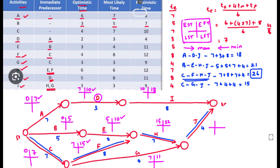For activity H there are two predecessors — EFT of E is 10 and EFT of F is 15. Going forward we take the maximum, so EST of H = 15 and EFT = 15 + 7 = 22. For J, the two predecessors give 22 and 11; taking the maximum, EST of J = 22 and EFT = 22 + 4 = 26.